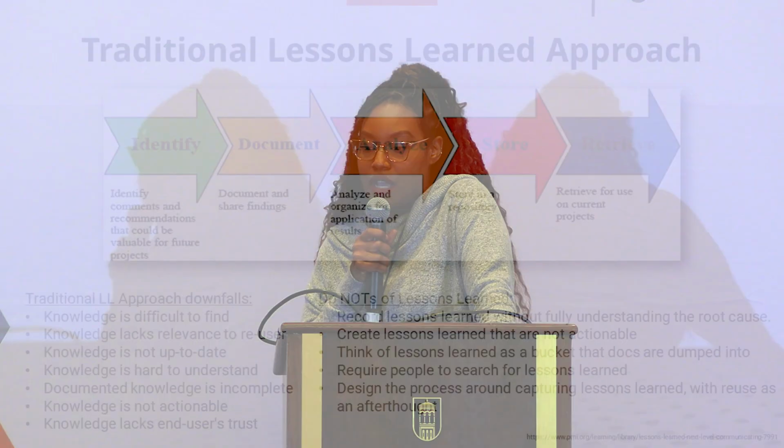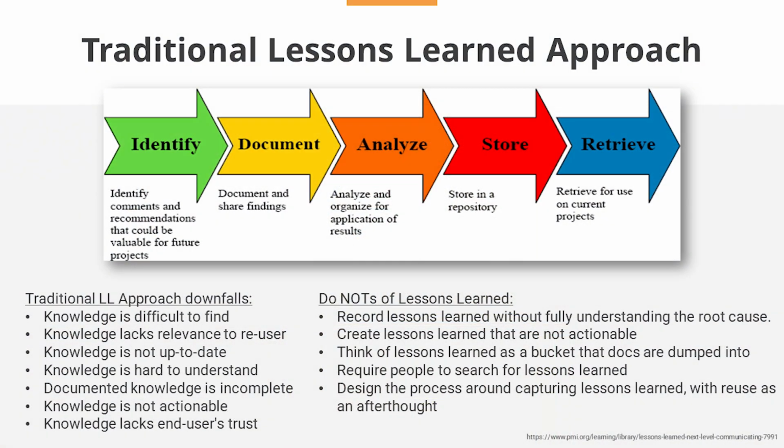Those are things we do not want to do when we are capturing lessons learned: not fully understand what's going on. We don't want to create lessons learned that are not actionable, as said before. We don't want to dump all of our lessons learned in a bucket repository full of a whole bunch of document types. We don't want to require people to go search for lessons learned. That wastes time. That's not effective or efficient for getting things done.